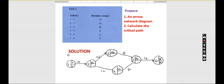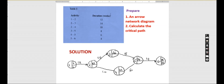Now we move to the backward pass, going backwards to find the latest times. 38 minus 4 gives us 34. 34 minus 8 gives us 26. 26 minus 14 gives us 12. And then 34 minus 6 gives us 28.